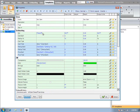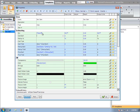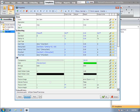As with all the previous versions of PlanSwift, whenever you're creating your formulations and the properties, you're just going to use property names. Just like I used takeoff, anything inside of a bracket is going to refer to another property. Anything inside of a bracket preceded by a dot backslash is going to look up one level to the property with the same name as whatever you type in here.